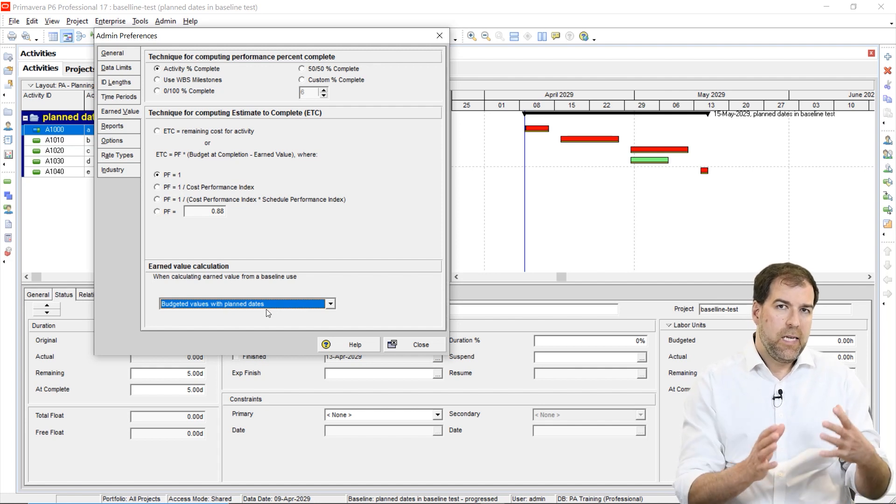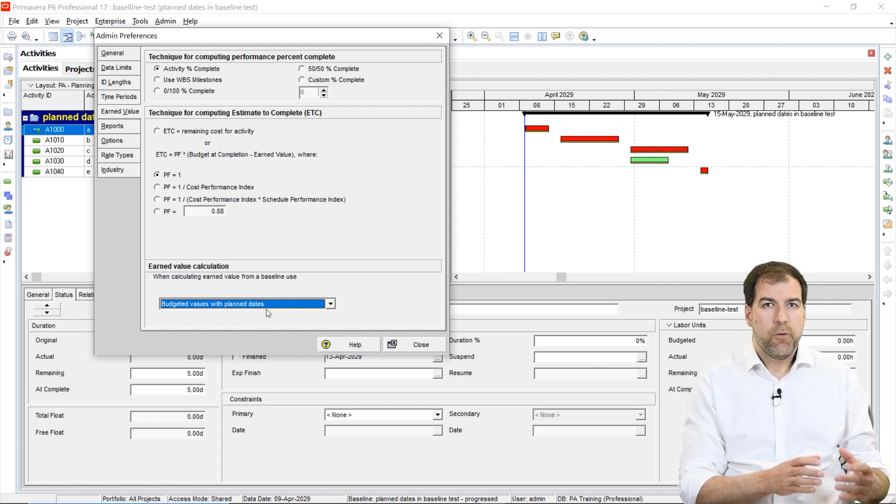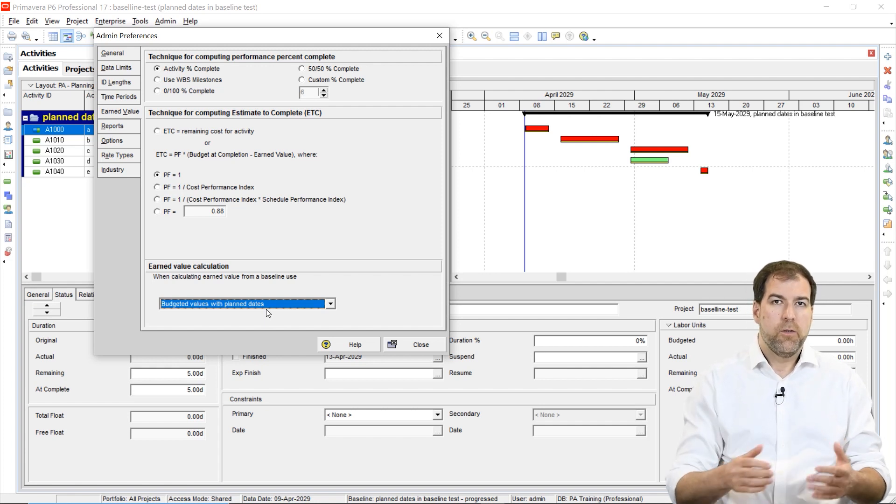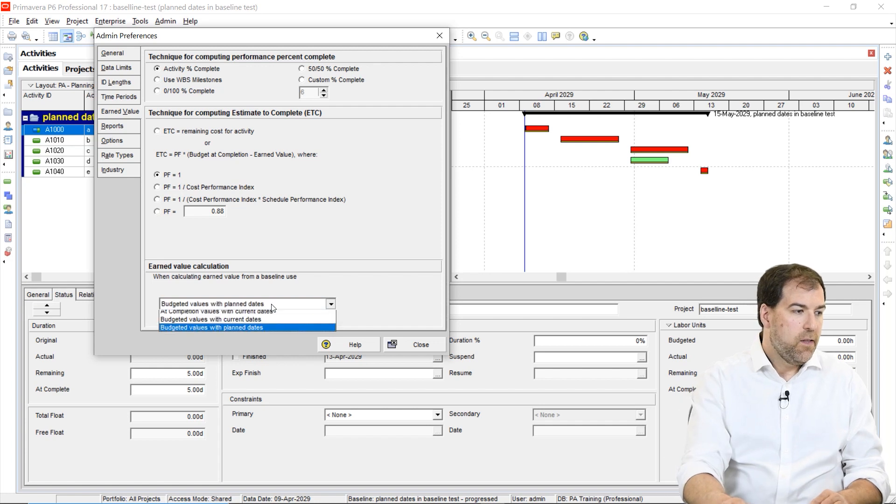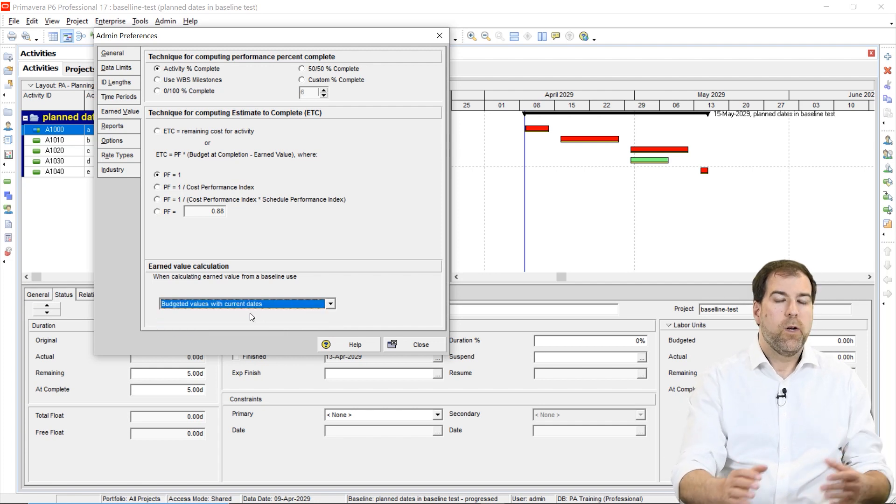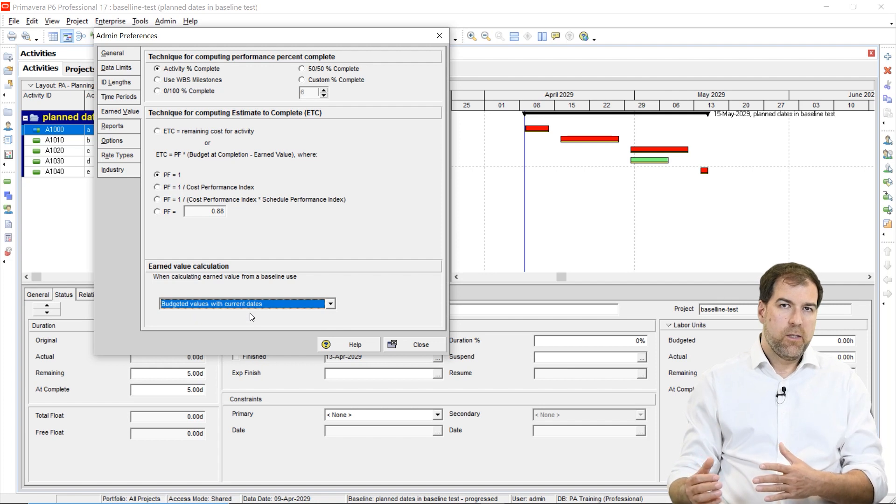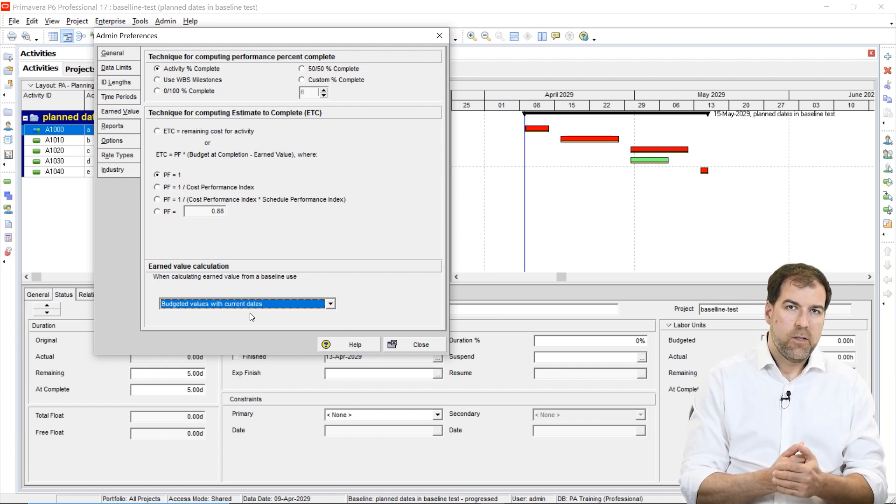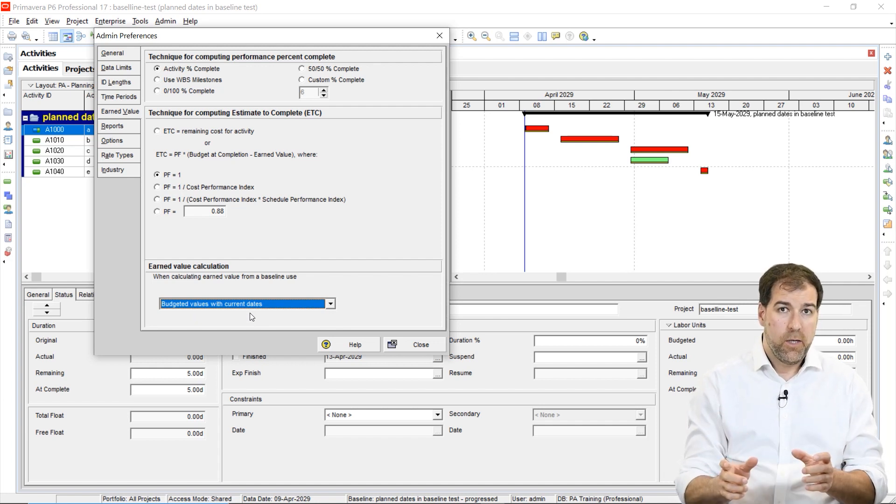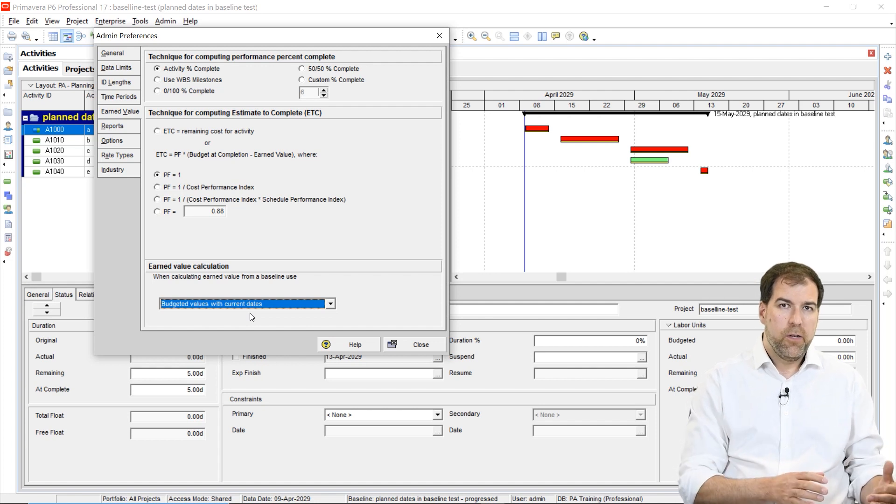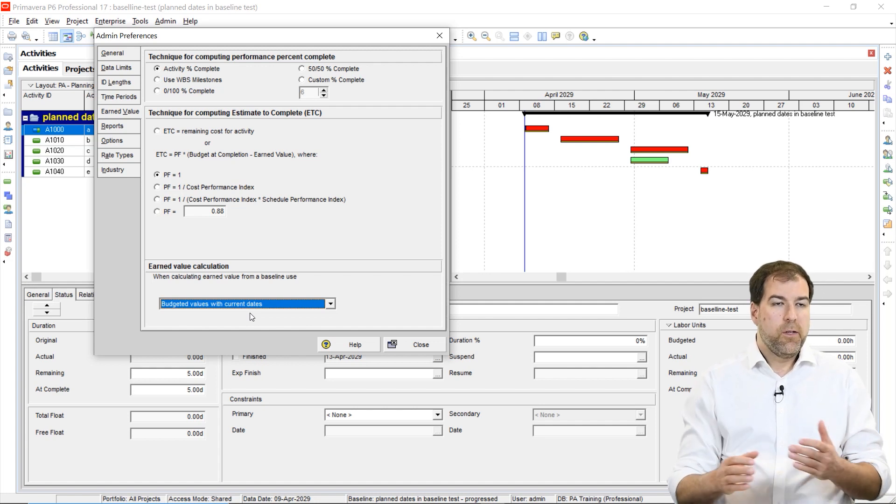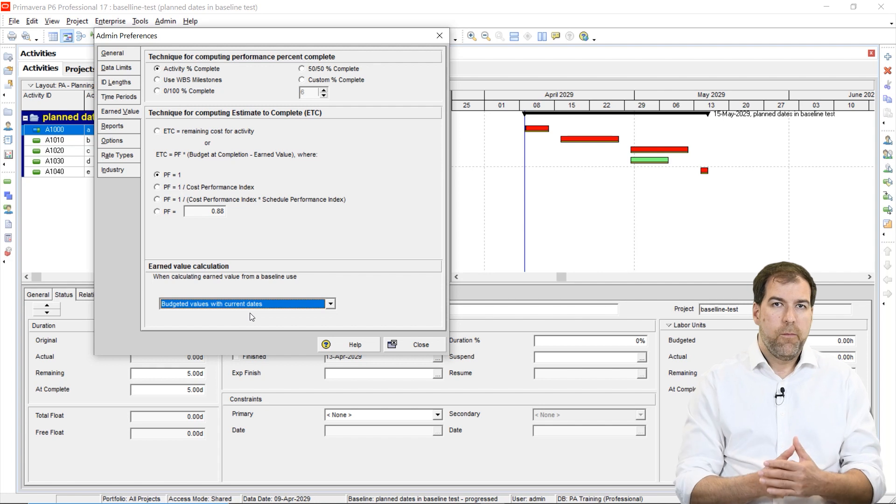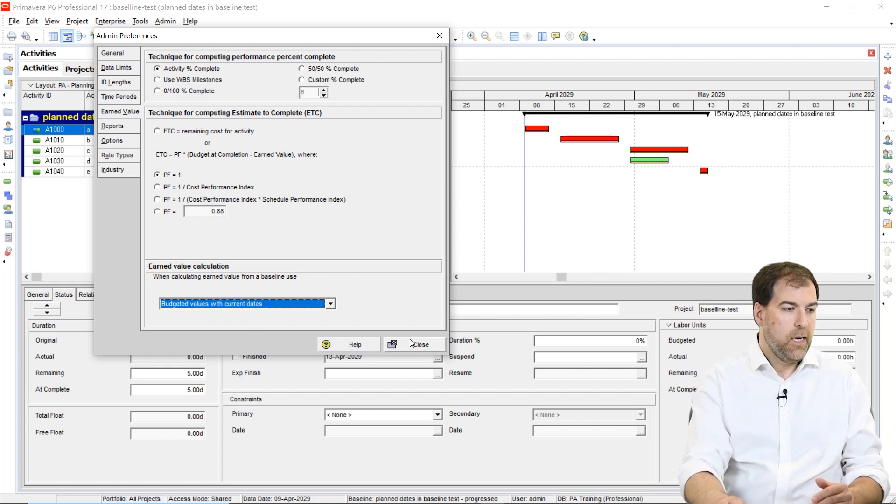We do not want to be using planned dates. Planned dates do not seem to be configured properly to give us the results that we want. We need this setting to be set to current dates. What I'm saying is actual dates. Let's display the actual dates start and finish on our baselines. And let's calculate earned value as well as our variances and whatnot from those actual dates.